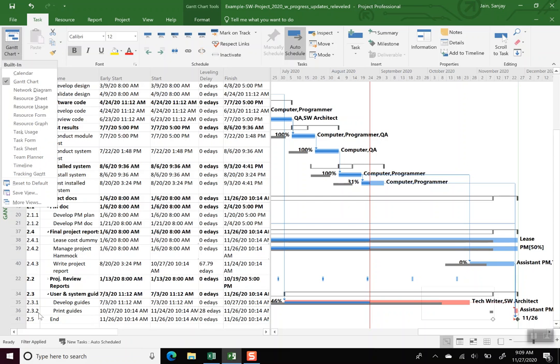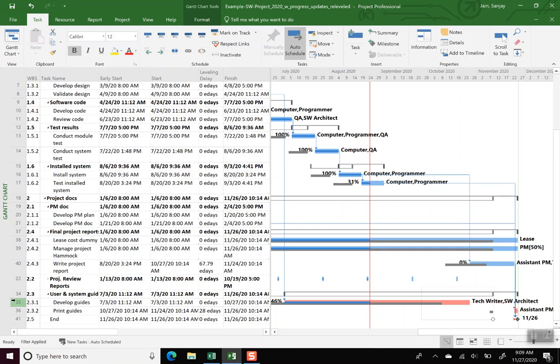The two activities that we are going to crash are basically on the resource critical path after the status date, which is activity 35, followed by activity 40. And then the third activity is really activity 36, but that's a very small activity to begin with.